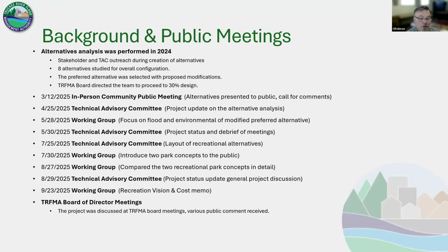And an example was when we recently did a project in Wadsworth. Two comments in particular. Hey, the children use that for school. So we changed the timing of when we replaced the bridge to make sure school was out. Another one was, hey, there's lighting. You don't have any lighting here. Well, we put the lighting on. So that influences us when we get comments like that, that it helps us with the design and makes it better. So thank you again for